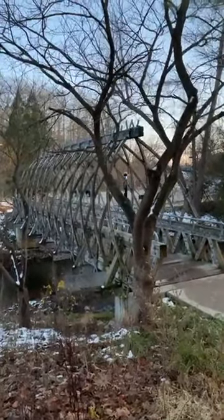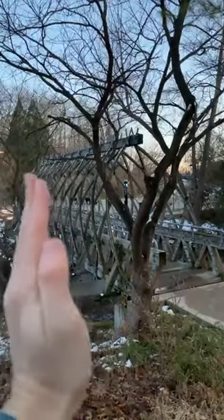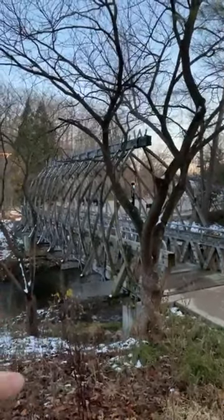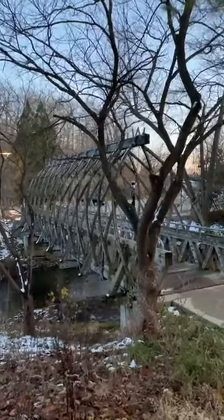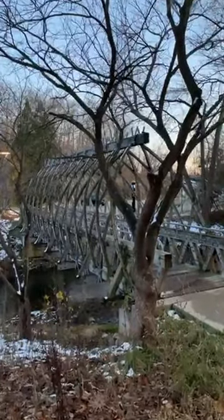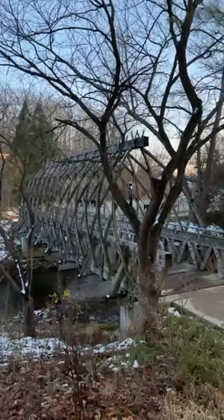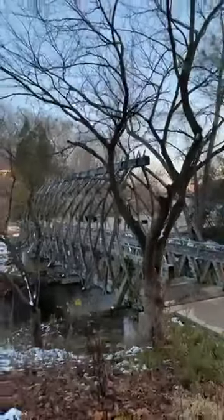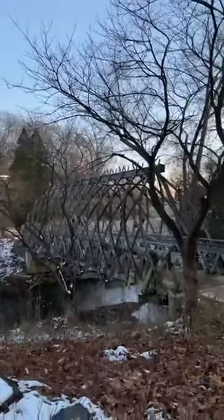So to get the curve of the trellis, they would take the wood and then glue it together into the curve and then bolt it on site. And the entire thing was trucked in. So it's just 58 feet long by, I don't know the actual dimension. What do we say? 9 feet wide. But it's the dimension of a flatbed truck. And so the entire thing came driving into the site, almost like a dinosaur on the back of a flatbed, from the warehouse where they had constructed it.